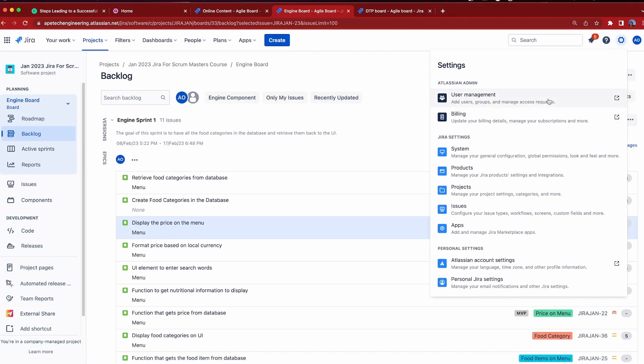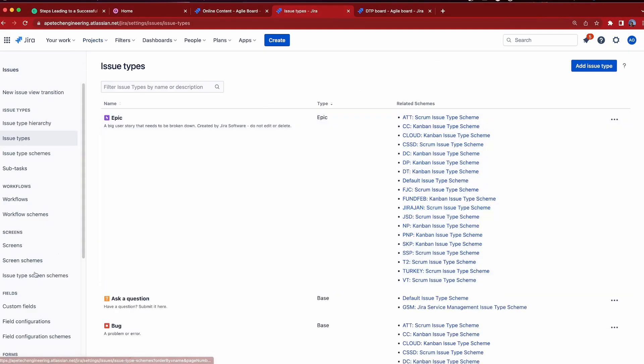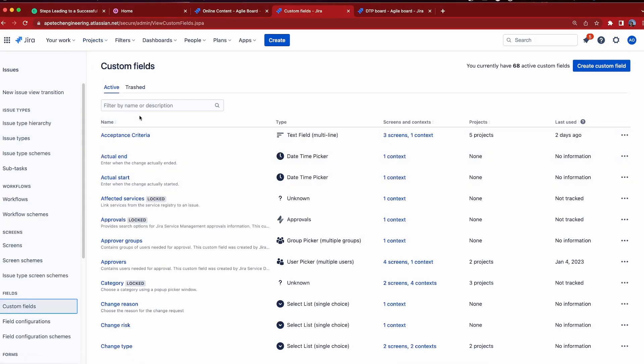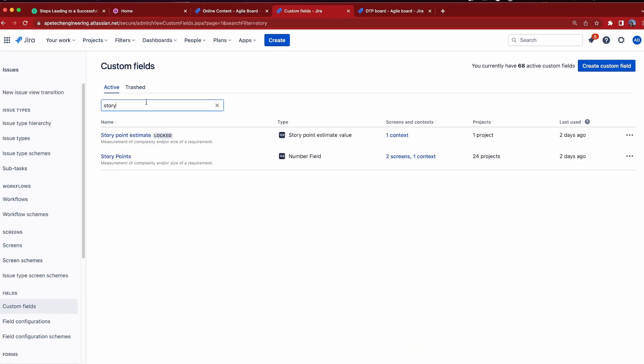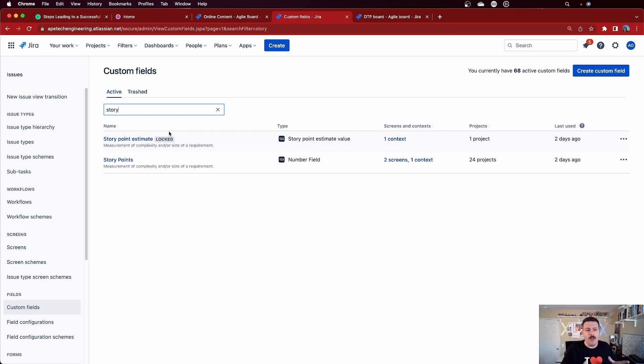First of all, we are actually working with two different fields. In a company managed project, we have a 'story point' field. In a team managed project, we have a 'story point estimate' field. Those are not the same fields — I can prove it to you. If I go back into Jira and go to custom fields, when I type in the word 'story,' you will see two different fields: one for the story point estimate and one for story points.